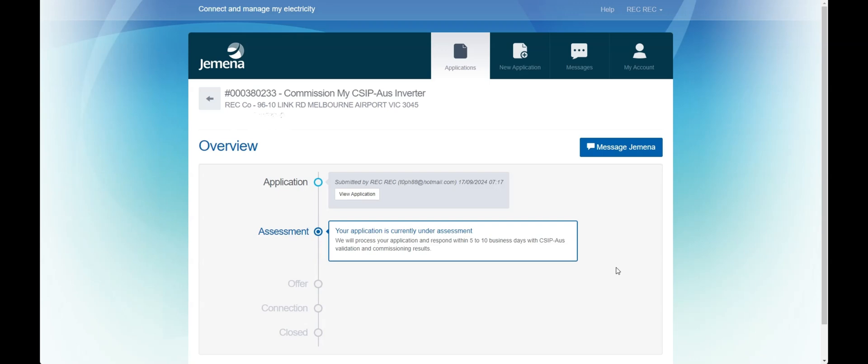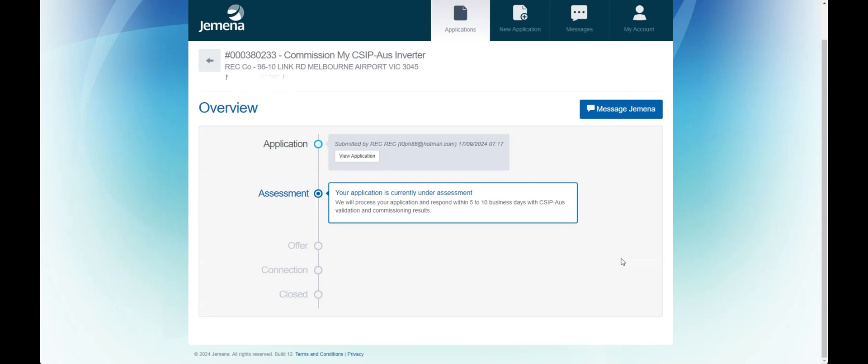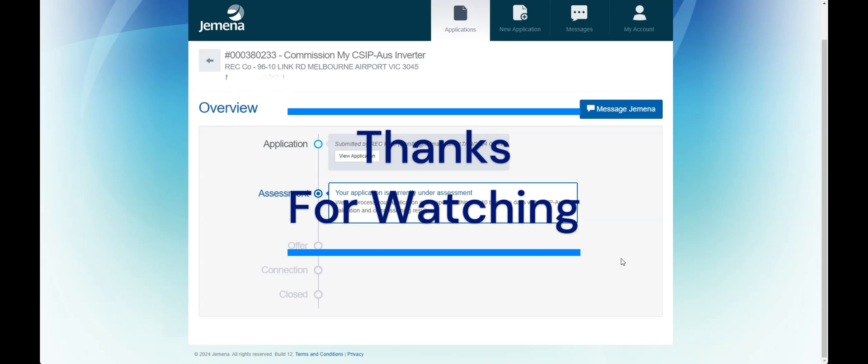When you are at this screen you'll know that your application was successfully submitted. It can take Gemina between 5 to 10 business days to provide you with a response.